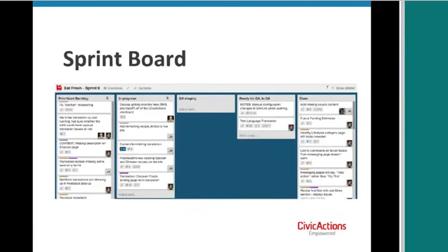So basically all the items, when they're done with development, would go through a review by the UX person to make sure that even the out-of-the-box stuff works well. And if it doesn't pass that, it would go back to development with some feedback so that the issue could be fixed, and then back to the UX person, through QA and then done.